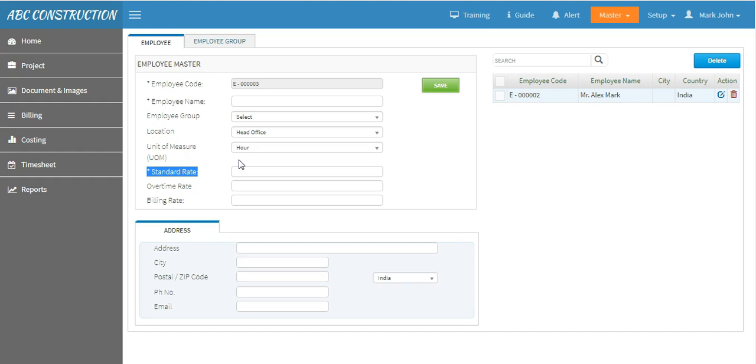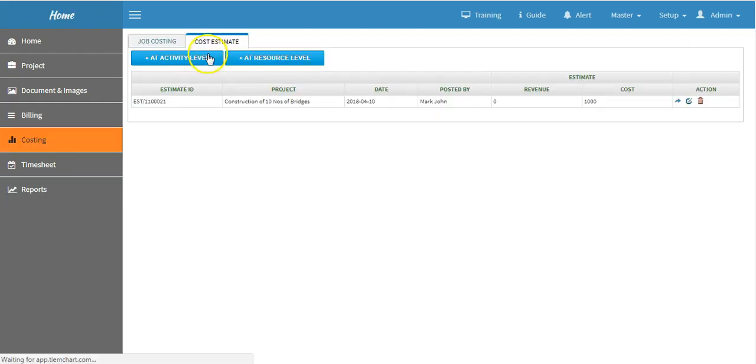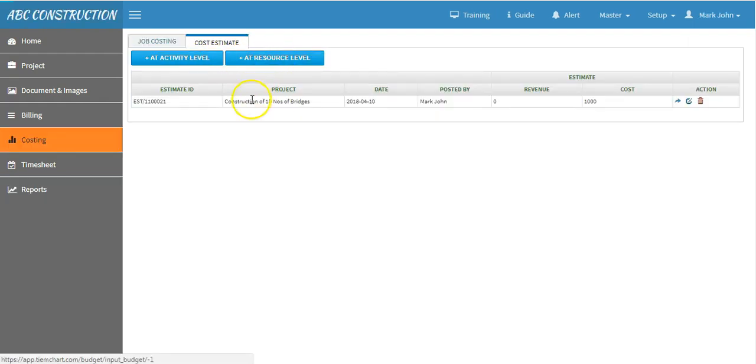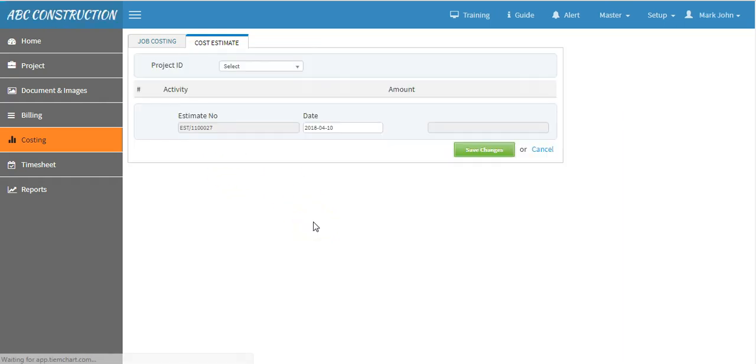Now come to costing and select cost estimation. Here you have two options: activity-based costing and resource-based costing. When you want to create estimates at individual activity level, select activity-based costing.